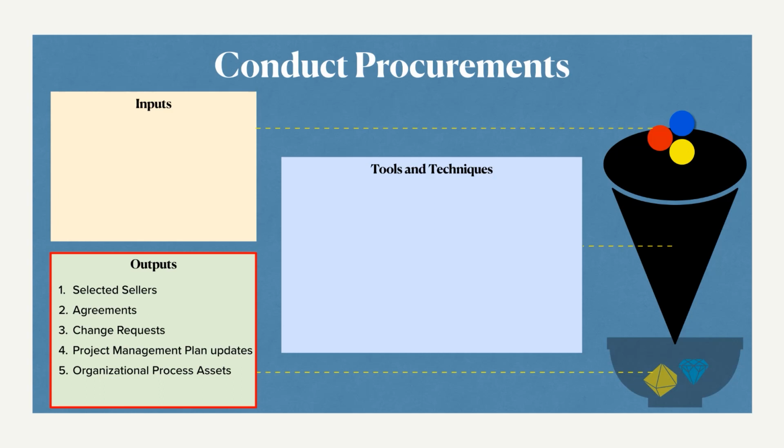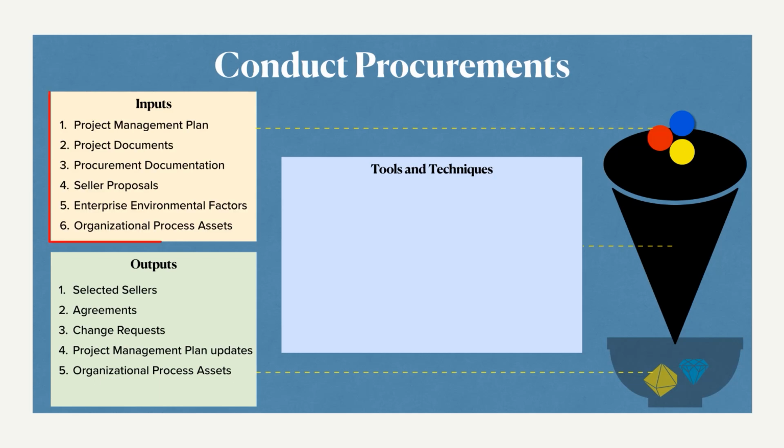Some suppliers we might have had a bad experience with, right? They are increasing the cost frequently, or they are not adhering to their schedule of producing the parts, or they are giving a lot of quality issues. All such bad experiences are recorded as lessons learned, and then they are deleted from the list of the complete organizational process assets. Let's take a look at the inputs that we need.